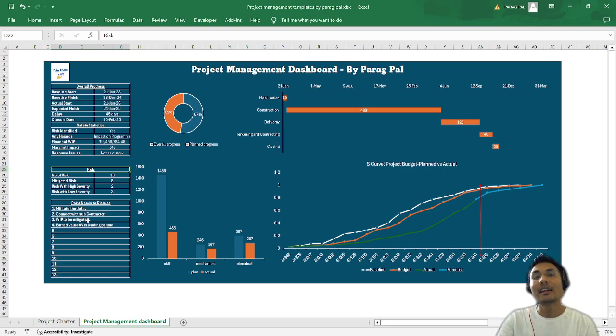The WIP needs to be mitigated. As per the Indian standard, it is 14 lakh 56,000, which is a very huge work in progress, an unbilled amount with you. So definitely you need to mitigate that over a time period. And the earned value versus actual value is lagging behind. That is also something we need to discuss with finance during the project review.